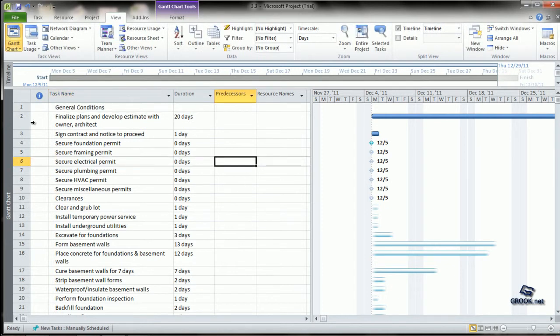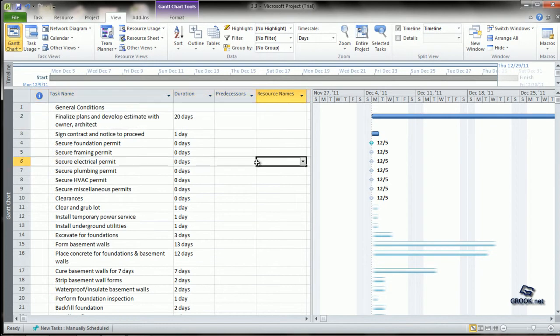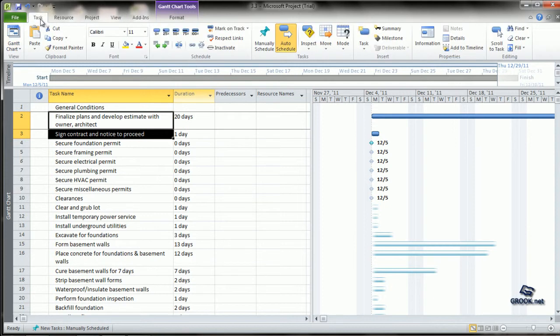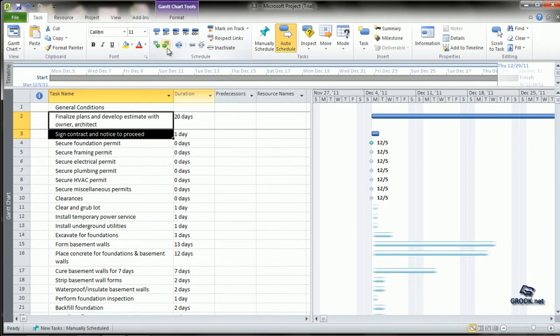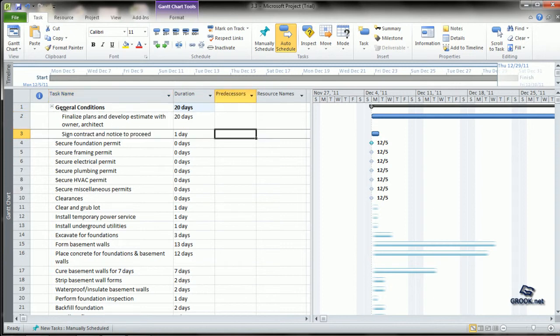Let us say we want task number 2 and task number 3 to be subtasks of task number 1. So we can select the two and go to the task tab and click the indent task from the schedule subtask. Now these two tasks have been indented within the main task which is also called a summary task.